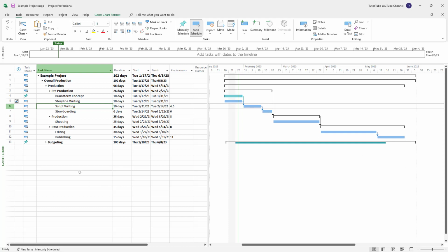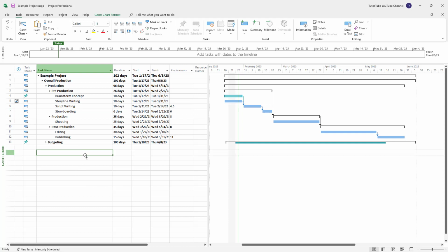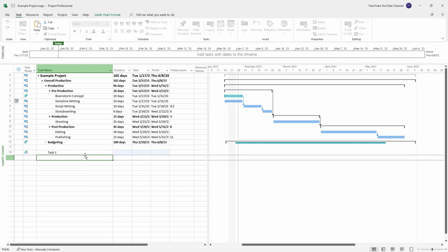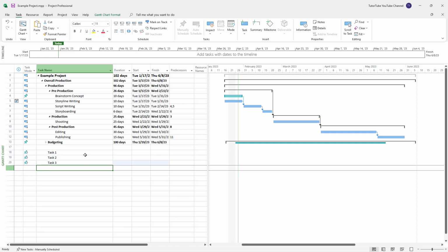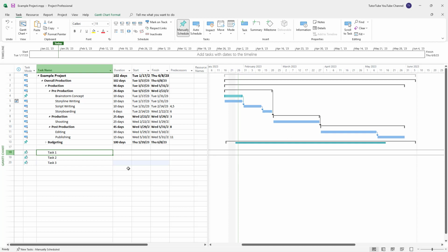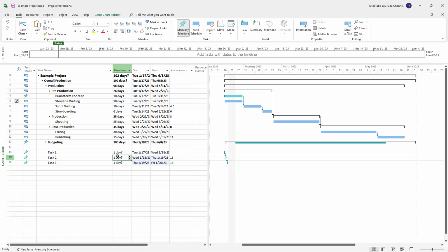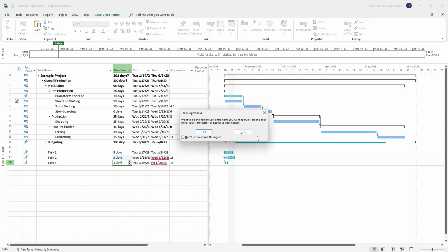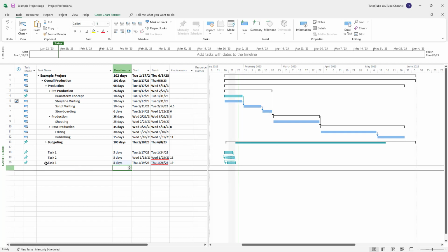the other task. But if you want to go ahead and change that, let me just go around and type in task 1, for example, and task 2 and task 3 right here, just like this. So this is what I have. If I were to go around over here and then link these together, I can link it together by clicking on this button. You can see that one task follows the next task right here. So I'm just going to go around and add in 5 days each right here, just like this. So this is what I have, as you can see.